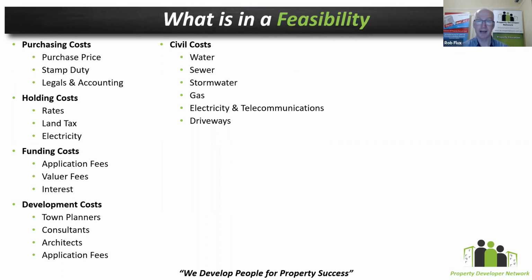And also the number of dwellings that you're actually creating and the additional demands you're supplying on the network. You need to assess whether or not the services that are already there, that are owned by the utility provider, need some form of upgrade in order to get there. And if you're going to do some of these projects out on the fringes of the city, it may be that none of these services are actually in place at all, and it's going to be you that installs all of them and plugs them back in.